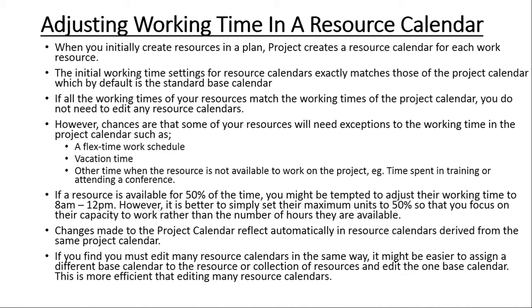So if all the working times of your resources match the working times on the project calendar, then you do not need to edit any of the resource calendars. So in other words, if we are using a standard calendar and all our people and equipment is going to work from Monday to Friday, 8 a.m. to 5 p.m., then we do not need to make any changes.